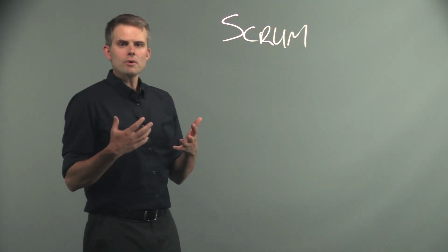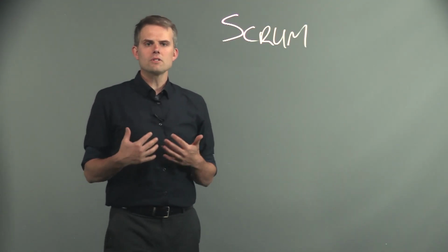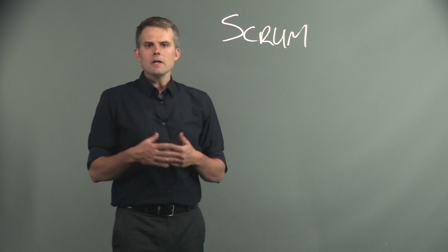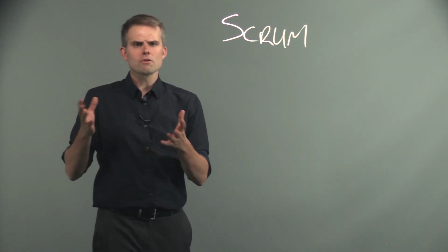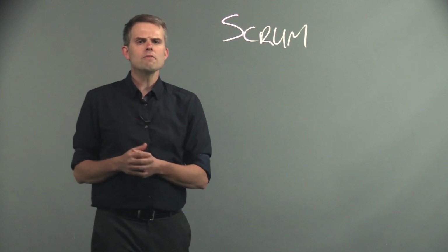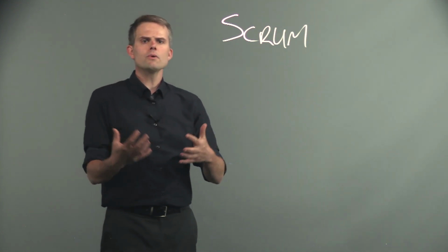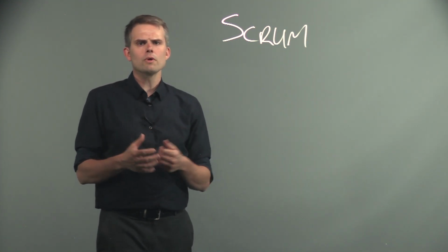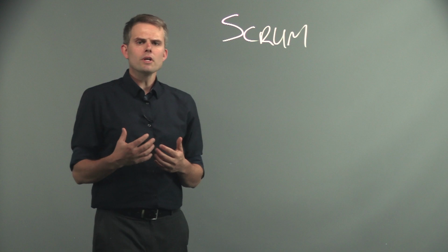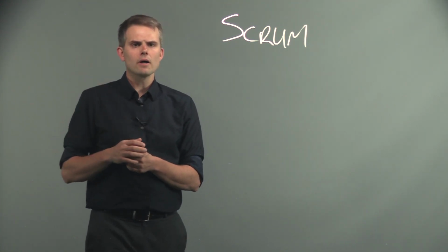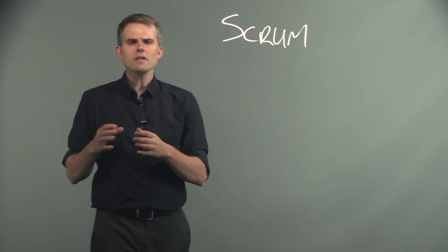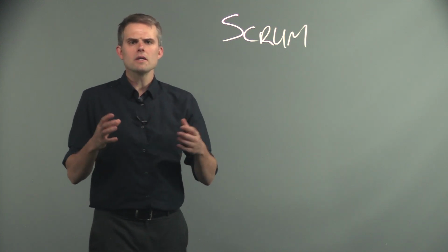Scrum-based methodologies represent the most common form of Agile methodology used in practice today. In Scrum, we have a product backlog which represents all of the issues, those are features and bugs, that remain to be fixed for a product. And then we work through a series of sprints that are usually 1 to 3 weeks long. In each sprint, we're working on what's known as the sprint backlog. So this is a subset of the product backlog, which contains just those specific issues that we want to work on in the individual sprint.